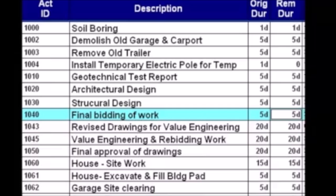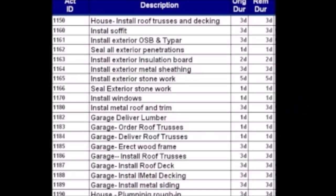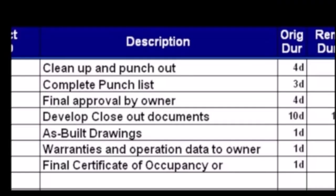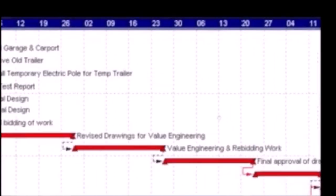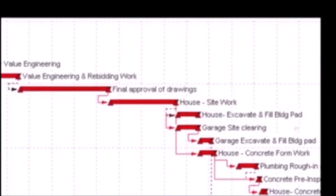From those items on your construction estimate, I put them into my SureTrack scheduling system. As you see here, they become the activities. You put them in order as I stated, but I've got a more detailed activity list. The durations are on the right-hand side from your estimate or from your trade contractors. The SureTrack scheduling system will give you a bar line for each activity, and from that you link those bar lines together in the order that you've identified them.